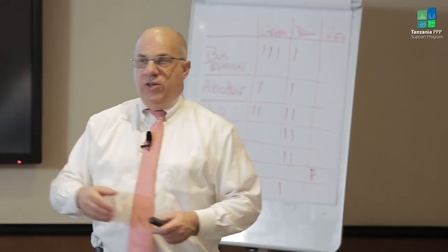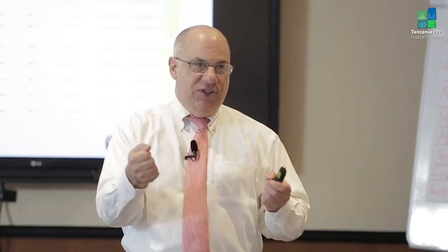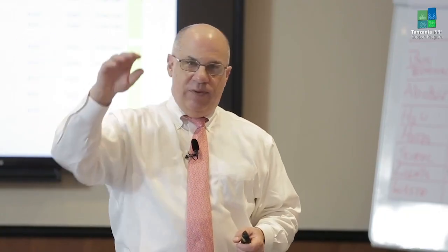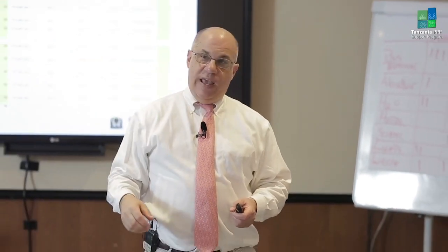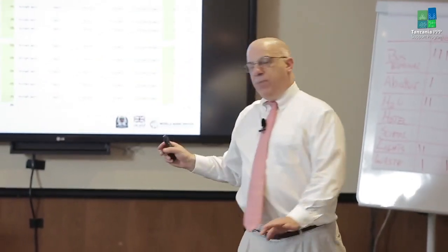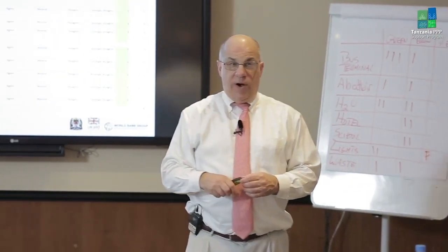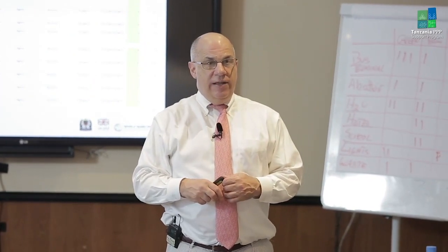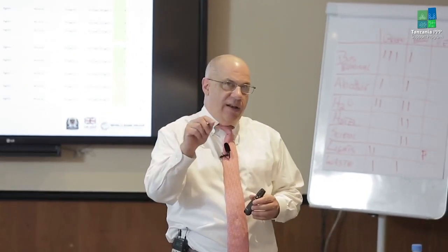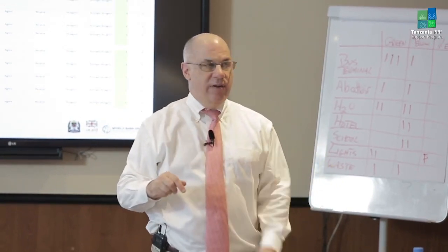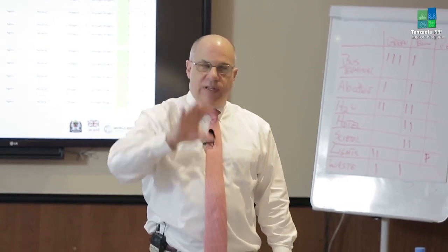The other thing I want you to be aware of, you look at what you did, you had an Excel spreadsheet, it gave you a number, right? It actually gave you a number, even to 1/10 of a point, and it generated red, yellow, green in terms of the outcome. Don't be super fooled by that. I like to call it false precision. If a project scores 7.9, another one scores 8.1, it doesn't mean that the 8.1 project is necessarily better. It's really just to give you some direction.